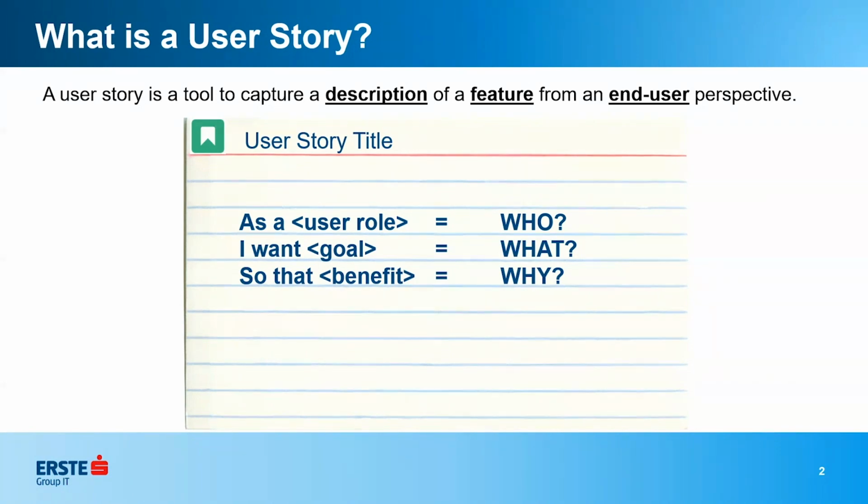And notice there's no how in the user story. So you're not looking for a solution here. You're purely looking for who, what, why. It should be like a short paragraph, one sentence. This is your story. But where do you put the how?